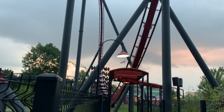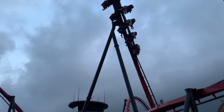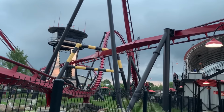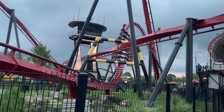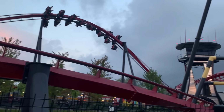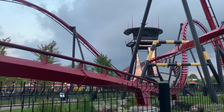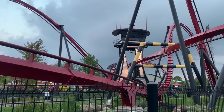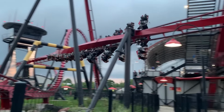Examples of quick load testing. I've done it to where, let's see, we loaded the train full up with water dummies. I put 20 cycles on the train full and then took another 20 cycles to unload the train. So that's about 40 cycles. And then put about another 20 or 30 cycles on that. So that's 60, maybe 70 cycles. And then that was it. I was done with that train. I'm like, good. Call it good.